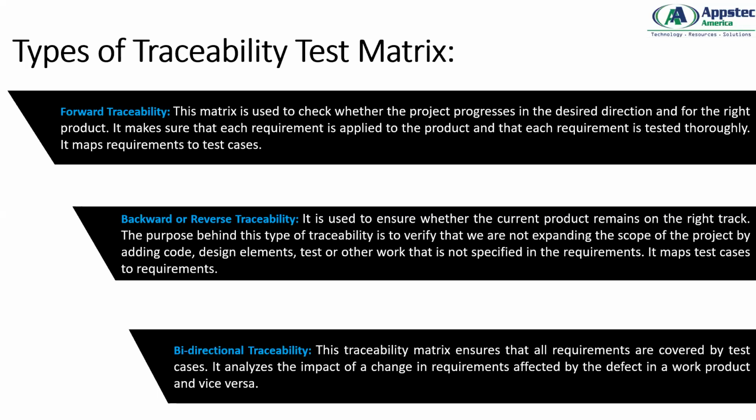In an application development, 7 or 8 developers will be working. Somebody is working on database development, somebody is working on interface development, like this. But yes, in RPA this reverse traceability is very less, but still you should be aware of the concept. So we should not be expanding anything by adding code. Let's say we have a requirement of 10 activities, and somebody has developed something which is out of requirement and has exceeded the current requirement. That should not be happening.